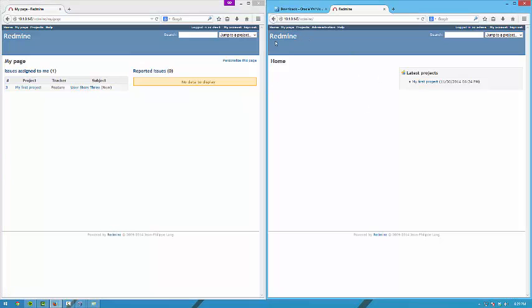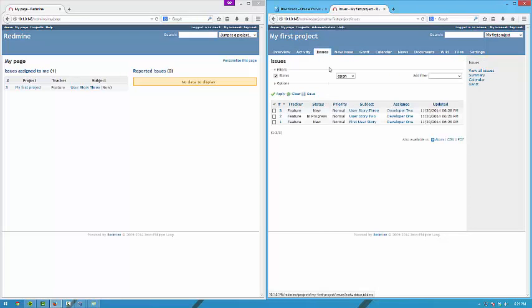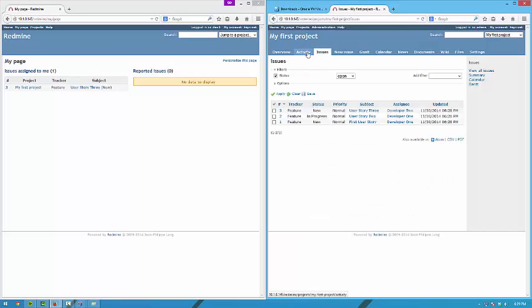So we go back to our admin view. Here we have the issues. New and in progress. It has a Gantt chart view, which most of them do. The thing is that we just did it on the same day, so it doesn't show, but it contains this feature which most of them do. As you see, it's pretty easy to use. You just have your tasks. If you want to apply sprints, you can just create your task with a two week span and then make them depending on each other.